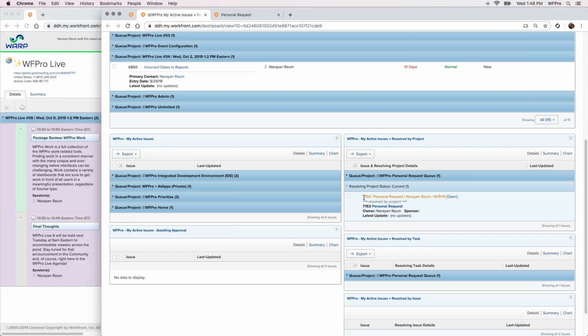And the reason I chose to stack these on top of one another is, again, it really helps the stakeholders wrap their head around that idea that the original issue remains intact, and that when you turn it into a project, if you keep that checkbox checked to keep the issue and tie its resolution, then they can understand how that original issue remains and how the project is what really resolves the original issue.